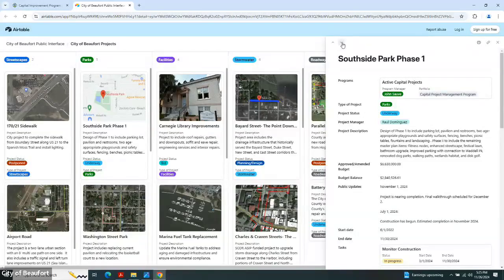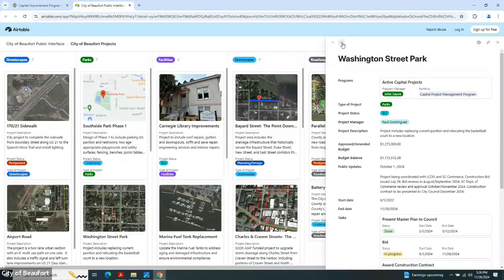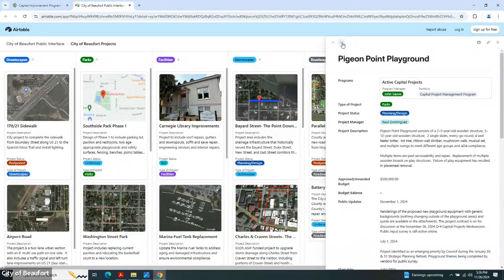Linda, do we have a confirmed date on the ribbon cutting? We have a budding Hollywood TV star that won't be here. If it is going to be anything, it'd be the week after the fourth, so it would be the following week. Understand that even though there's a walkthrough, the walkthrough is a final, but there may be some other things on the punch list. So we want to make sure that we get through that inspection first to make sure that everything is done, and then we'll make that decision.